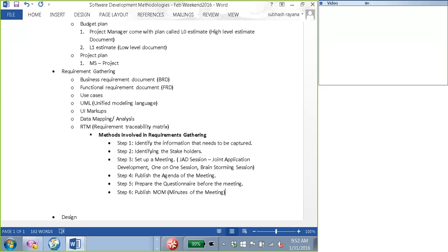If you're asking what information is normally captured in a meeting minute, you will capture the list of attendees who attended the meeting, the key conclusions, the decisions made in the meeting, the executive decisions, and the open items. When I say open items, I mean the pending action items.